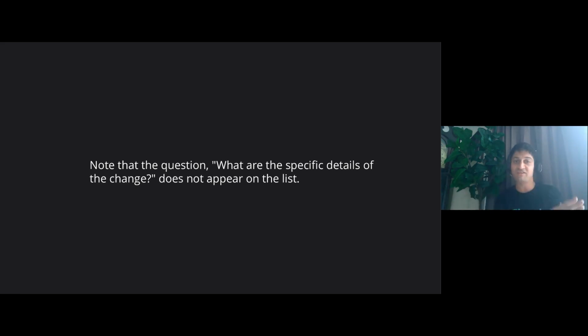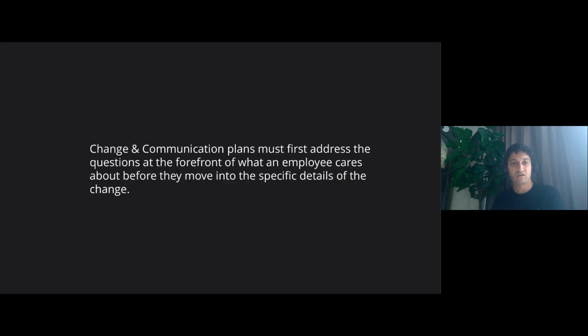But we should focus on all the other things I spoke about just now, around the why and the what's in it for me. Any change comms plan that's created must first address the first few questions that the employee directly cares about, before moving into the specific details of what the change is all about.